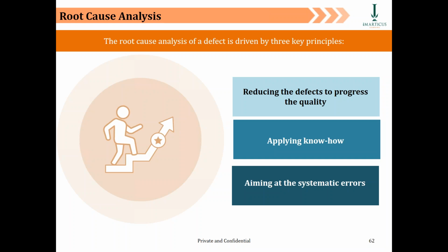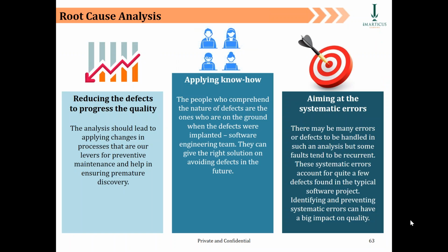So while you reduce 60 errors, what happens? You don't have to do defect mitigation for those 60 errors, which you are doing in your operational nature of work every month. Second, you don't have to add defect resolution. This means you don't have to provide those standard defect resolutions which the configurator or tester in your team was giving to rectify those errors. They don't have to do that anymore. So you're saving quality and effort both, something which you can use for making other quality changes in your project.